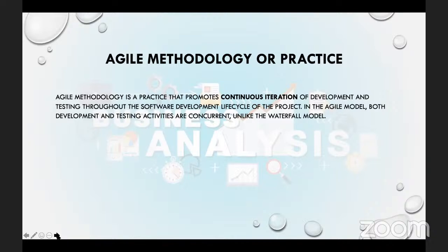If you realize in the projects that you did, you start with requirement gathering, you do all those things, and then you move to design, go into development, QA, etc. You follow that same pattern in Agile, and in waterfall as well. In waterfall, we have to get something complete. If we're building something like a banking platform, we'll get all these features done, and then testing will commence. So one phase after the other, that is waterfall. When development work is done, then the testing phase will commence.